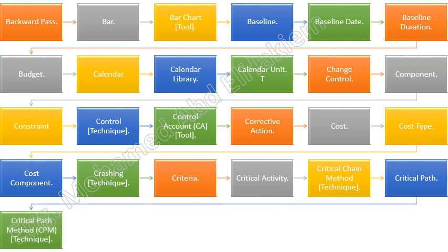Critical path method, CPM, technique. A schedule network analysis technique used to determine the amount of scheduling flexibility, the amount of float, on various logical network paths in the project schedule network, and to determine the minimum total project duration. Early start and finish dates are calculated by means of a forward pass, using a specified start date. Late start and finish dates are calculated by means of a backward pass, starting from specified completion date, which sometimes is the project early finish date determined during the forward pass calculation. See also critical path.